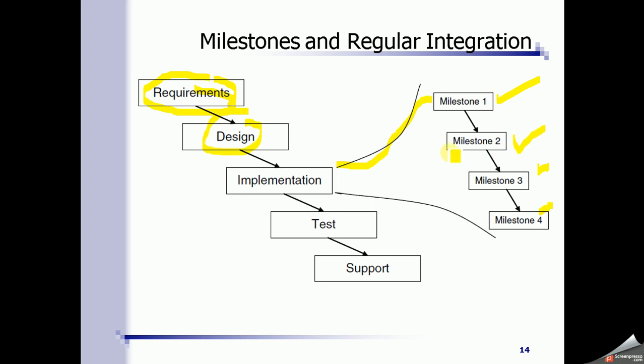Milestone 2, again, will take, let's say, 1 month, and it will deliver another set of use cases, and so on and so forth. So every milestone delivers something. This milestone is handed over to the testing team. They test it against the requirements, and if problems are found, they can be fixed relatively easily. So every milestone will deliver something, and it can be tested in every milestone.